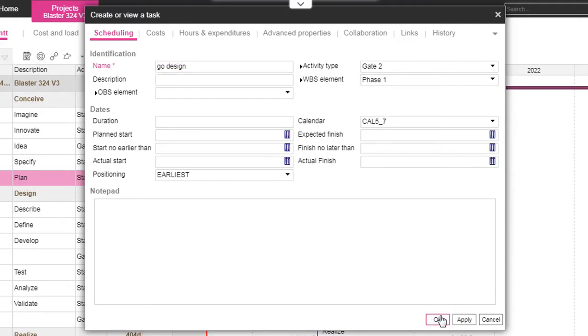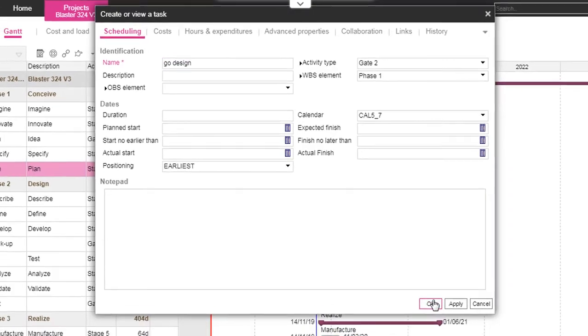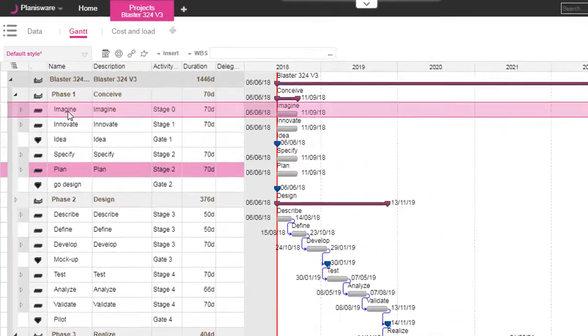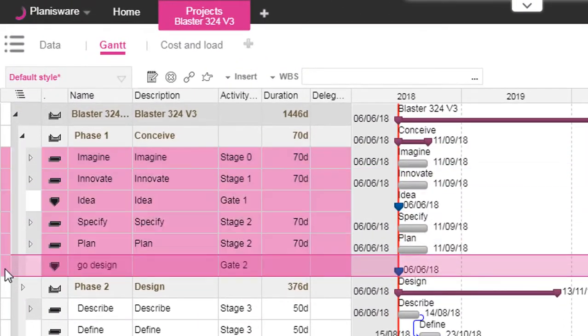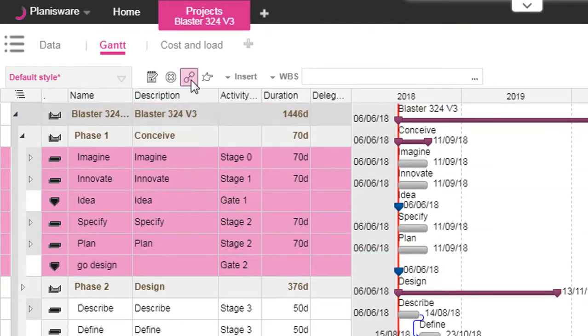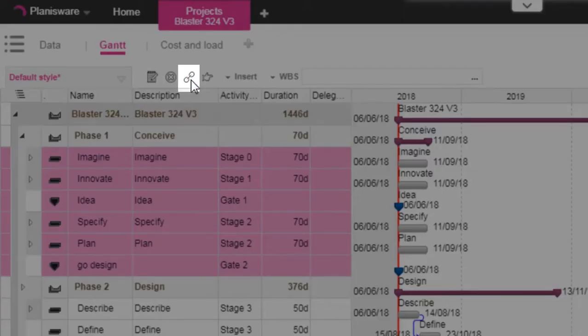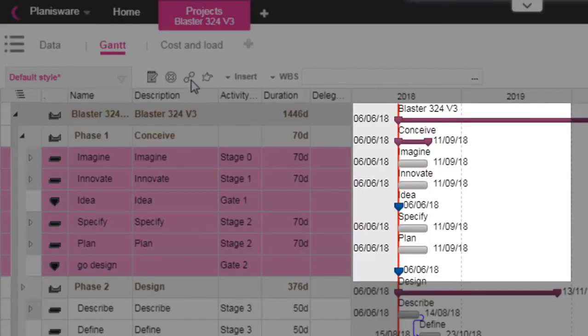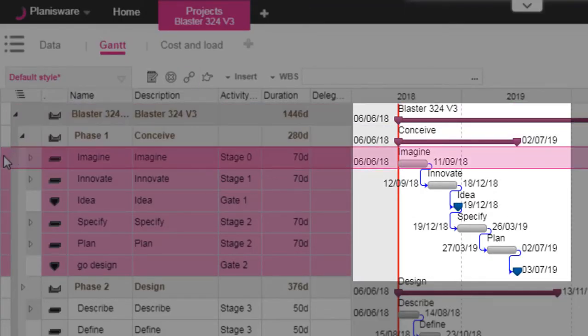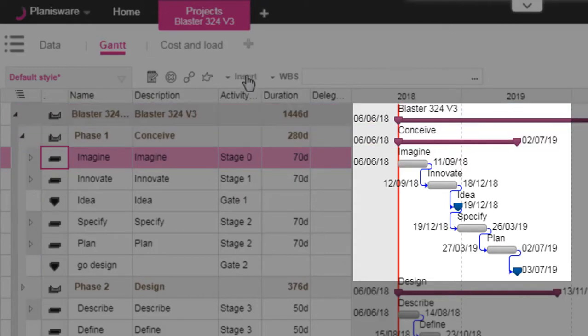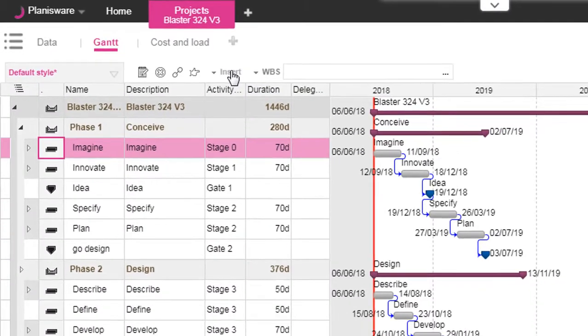Now, let's create a finish-to-start link between all activities of our sub-project. Select all the activities you want to link and click the corresponding tool, and everything is updated automatically.